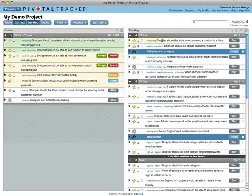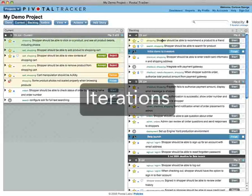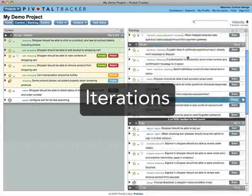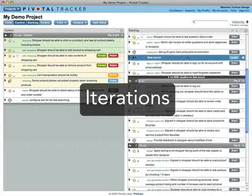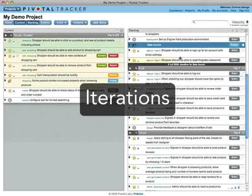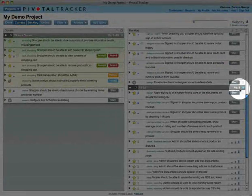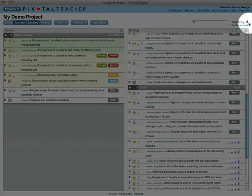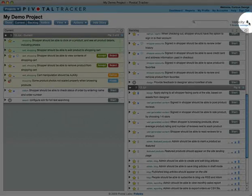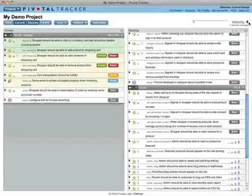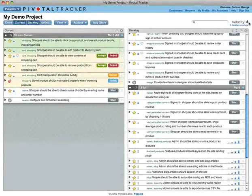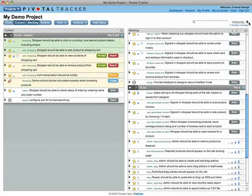In Tracker, your schedule is divided into iterations. The current panel holds one iteration and each iteration only holds a certain number of points. This is your velocity and it helps Tracker predict how much your team will complete each week.